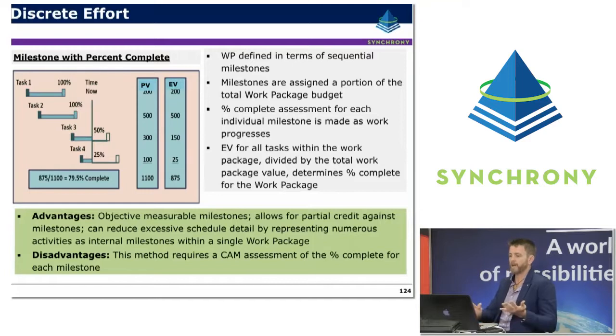So basically the work package is defined in terms of sequential milestones. These milestones are assigned a proportion of the overall work package budget. A percentage complete is assessed for each milestone, and those percent completes contribute towards the overall earned value.